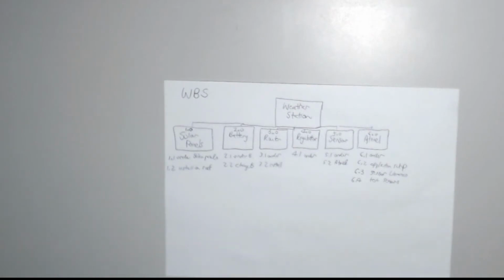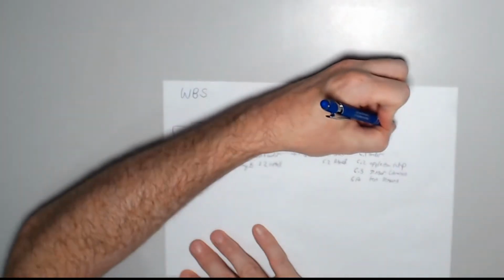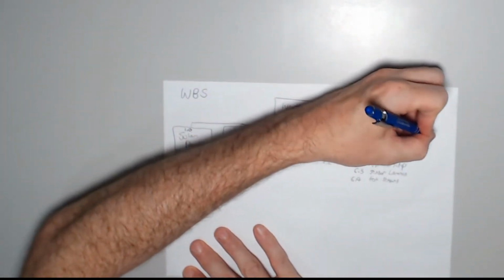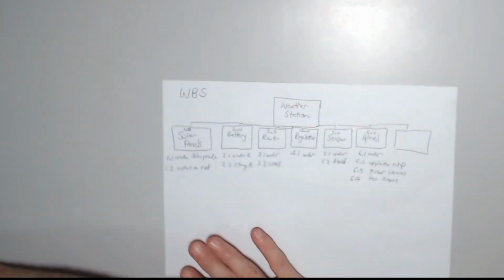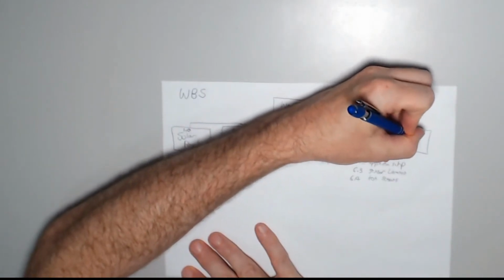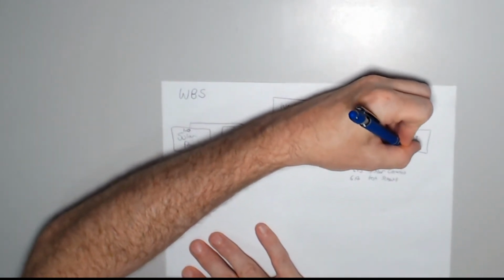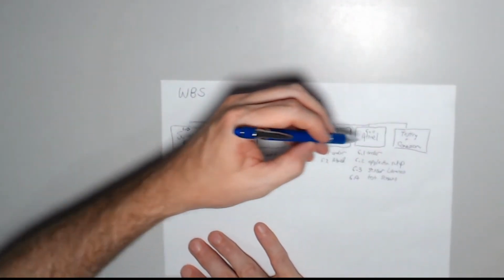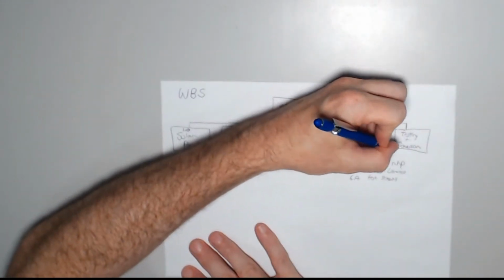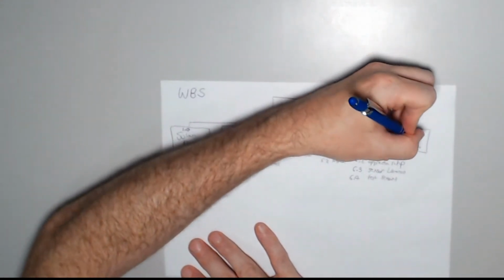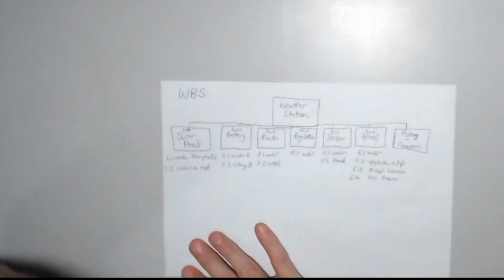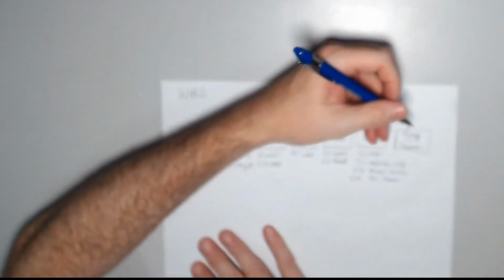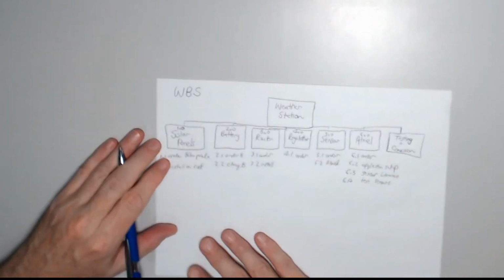So where are we going to do that in here? I think it's probably best that we add another item to our list. And here we're going to call this testing and commission. So we've broken our rules a little bit here of having these as sub-products. I'm now adding a work package for actually putting this all together. There's many different ways of doing this, but this seems reasonable and logical in this situation, so let's proceed.